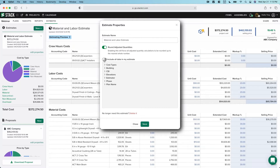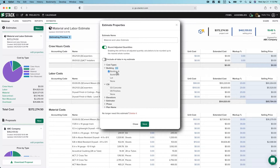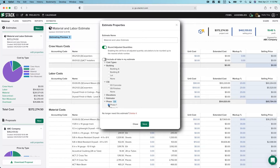We can filter this data so that I can build an estimate and a proposal specifically on the data that I want — which is a true power within STACK. For example, I could build out an estimate on my division nine, or build out an estimate and a proposal for building A, or build an estimate on phase one, or any combination. I could do phase one concrete of building A. You have complete control over how you want to present your data.